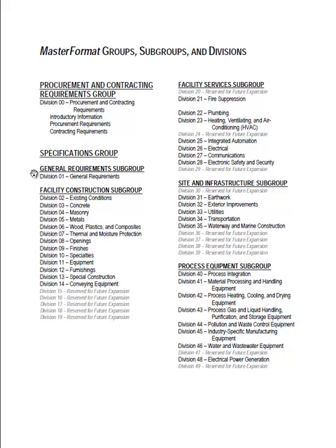labor wage rates, those types of things are all included in the front end documents. And then we get into our specifications. General requirements are also part of the front end documents in that they talk about what is required of the contractor and subcontractor. So even though you might be a painter or a door and window person, these general requirements basically apply to everybody that's on the job site. They will talk about smoking requirements, behavior on the job site. They talk about liquidated damages, how much you might need to pay if you're late getting something done or if it's not done on time. So we'll take a look at those.